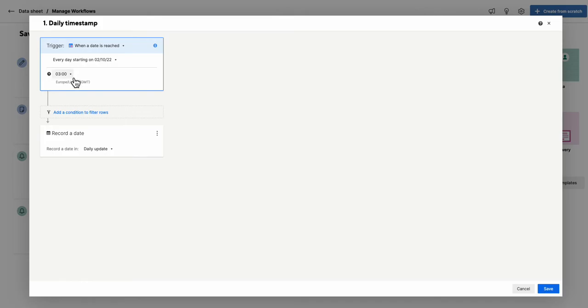And I've set it to run at three o'clock in the morning. What it means then is no one's in the sheet at three o'clock in the morning. The timestamp goes off. And what it does is it records today's date in a daily update column.